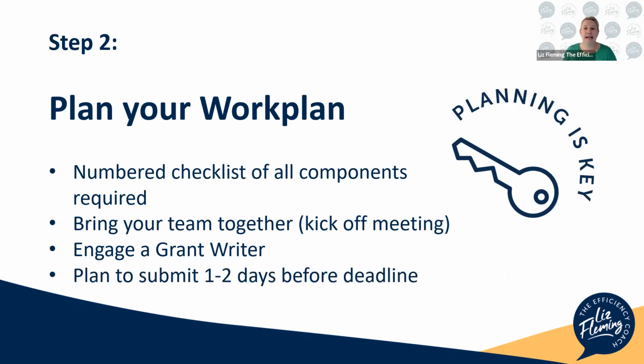And when you're planning this out, again, we need to be mindful of when it's due, that submission date, and plan to submit one or two days before the deadline. We don't want to be trying to type it all in or copying and pasting at 11 o'clock at night when it closes at 11:59, because nobody is going to be online to help you. They're not going to accept an email. It's got to be in that portal. So we need to give ourselves some time, and we don't want delays and stress right up to that last minute. I've seen it where people's computers have crashed and they've just not been able to submit it. So it's a waste of work just for such a small thing.